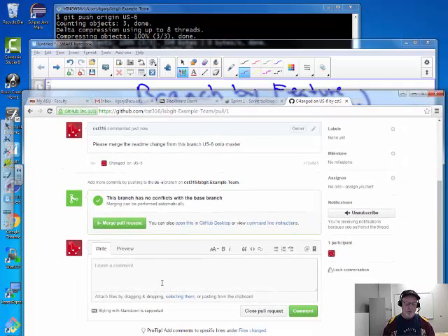Now, at this point, making the pull request, the rest of the team should see it. Pull requests should be reviewed by the team for the team's quality policy. Now, what they're going to want to know is, hey, have you written the unit tests that we want to write? Have you done the code reviews that the team wants to do and that Dr. Gary's asking for? Going forward, have you run the metrics tools? Have you run the static analysis? Have you made those corrections? Is that code of the level of quality that it needs to be for us to accept it into the product? If it is, you can say so.